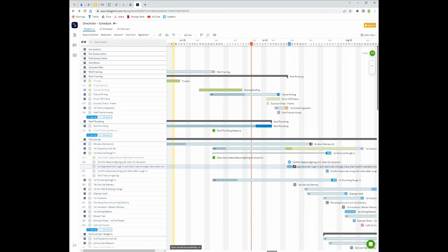Also, with things like electricians and plumbers, I'll do a walkthrough with the electrical company and plumbing company, and the trade tilers now, just to make sure what the clients expect is correct. So two weeks to get arranged with the electrician, the client walkthrough, that's about two weeks in advance. Yeah, this works really well for me, guys.